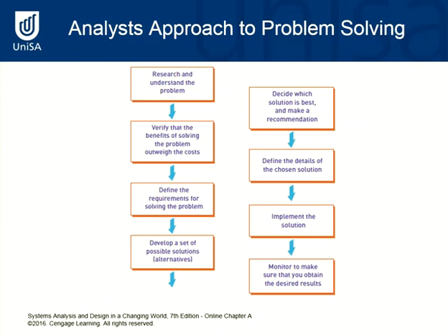Is what we're doing really going to provide some benefit to the organisation? What is the likelihood of the costs? It's going to cost $100,000, but the benefit is that over 10 years we'll see a profit of whatever. So you can make those ballpark guesstimates at the beginning, because someone has to go to management and say, this is what it's going to look like, give us the money to go ahead and start designing and speaking to people. So there's a bit of pre-analysis that takes place.